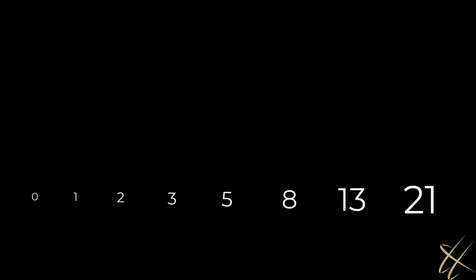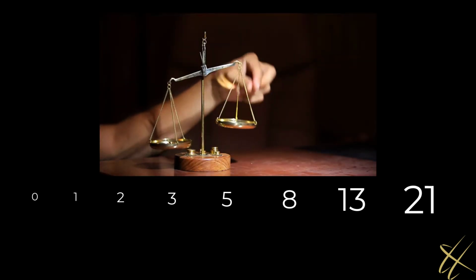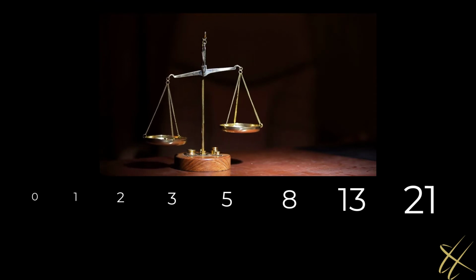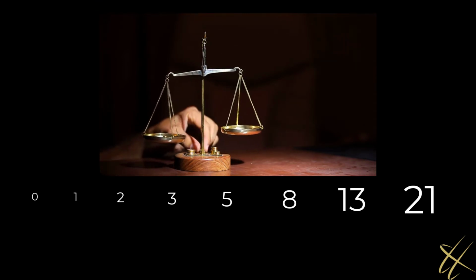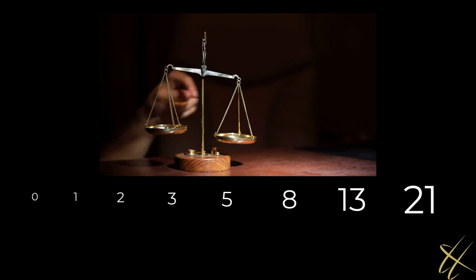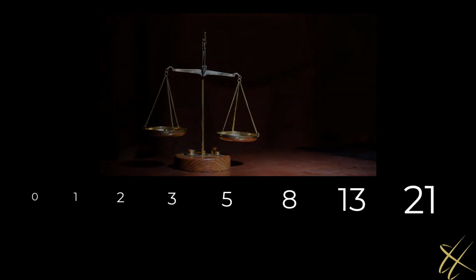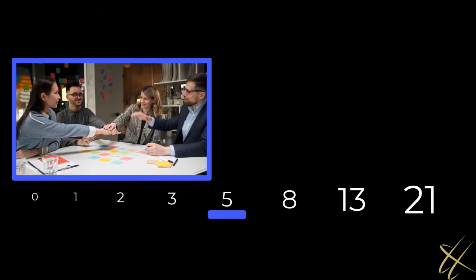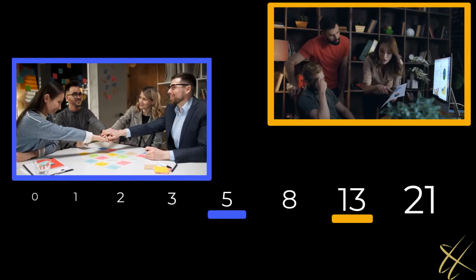Each number in the sequence can be considered approximately double the effort of the previous number. The other benefit of this sequence is that these numbers don't mean anything in particular until the team determines what factors to consider as they define effort. One team's 5 might be another team's 13, for instance.